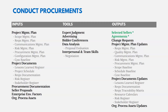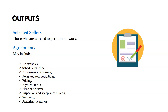The key outputs of the Conduct Procurements process are selected sellers and agreements. Selected sellers are those chosen to perform the work, and agreements are contracts where they promise to deliver and we promise to pay. Those agreements typically include deliverables, the schedule baseline, performance reporting, roles and responsibilities, pricing, payment terms, and so on.